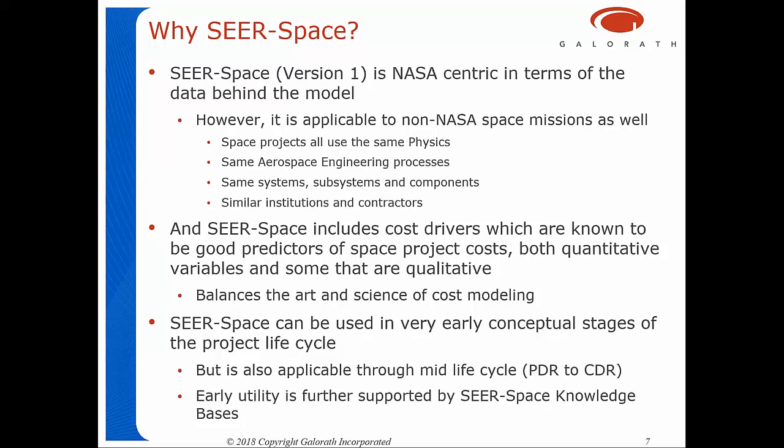And it's also got a rich set of independent variables that will let you model the distinctive aspects of whatever culture you're in. SEER Space includes cost drivers that are known to be good predictors of space projects. Most of them are quantitative. Quite a few, though, are also qualitative. And we proudly have the qualitative variables in the model because we believe that cost estimating is really a blend of art and science. If you don't have some of the more qualitative things in there, you're really not speaking to all the things that drive cost. So I'm talking about things like heritage, technology readiness level, the capability of your team, that sort of thing.